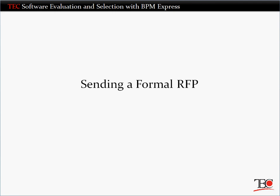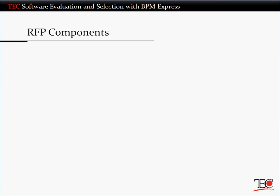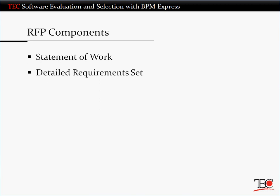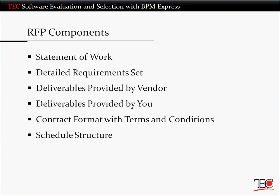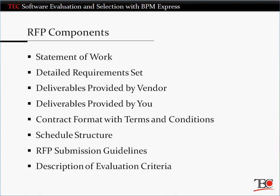Your in-depth evaluation begins by issuing a Formal Request for Proposal, or RFP. TEC can help you develop a comprehensive RFP document that includes the structure and required inputs for a detailed statement of work, including references and demonstration scripts, a complete list of your requirements to be revalidated by the vendors, a list of deliverables the vendor must provide, a list of deliverables you must provide to support the project, a contract format, legal terms and conditions, relevant procurement information, the structure and required inputs for a full project and implementation schedule, submission guidelines for the RFP, and a description of the criteria you'll use to evaluate the vendors.